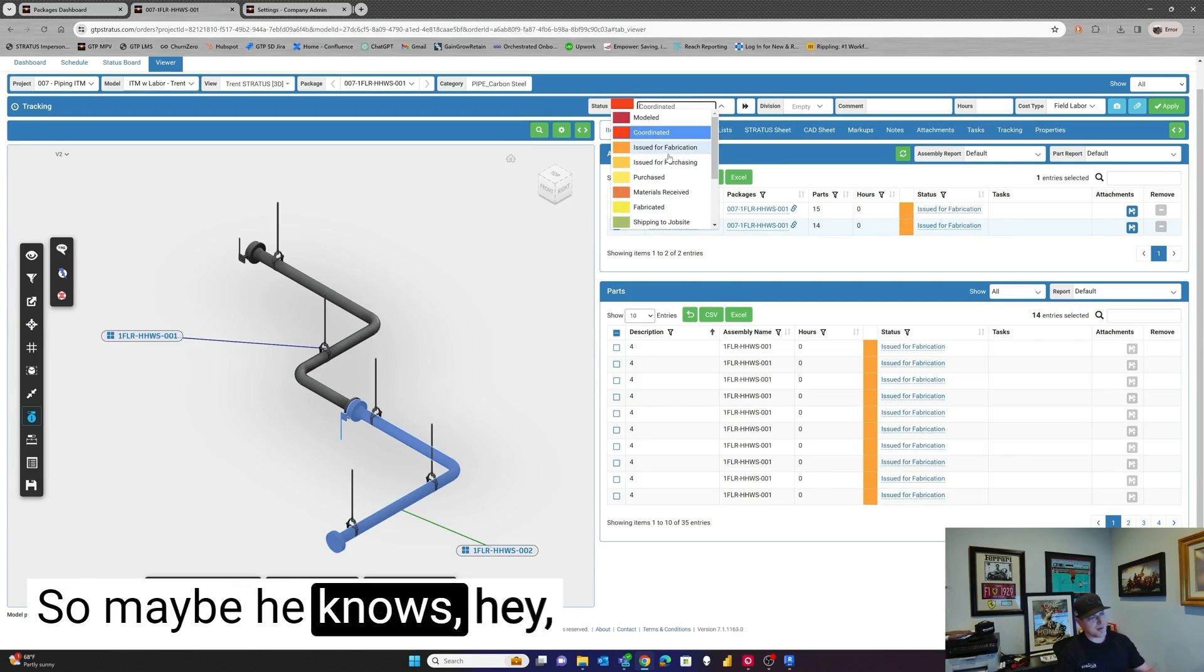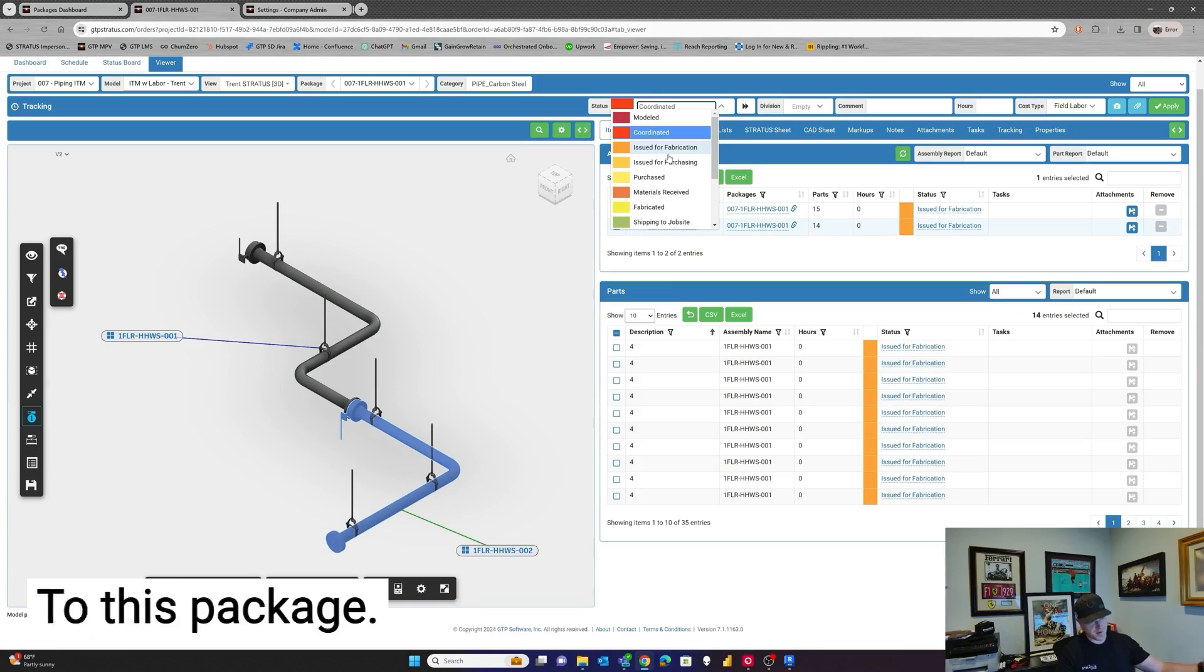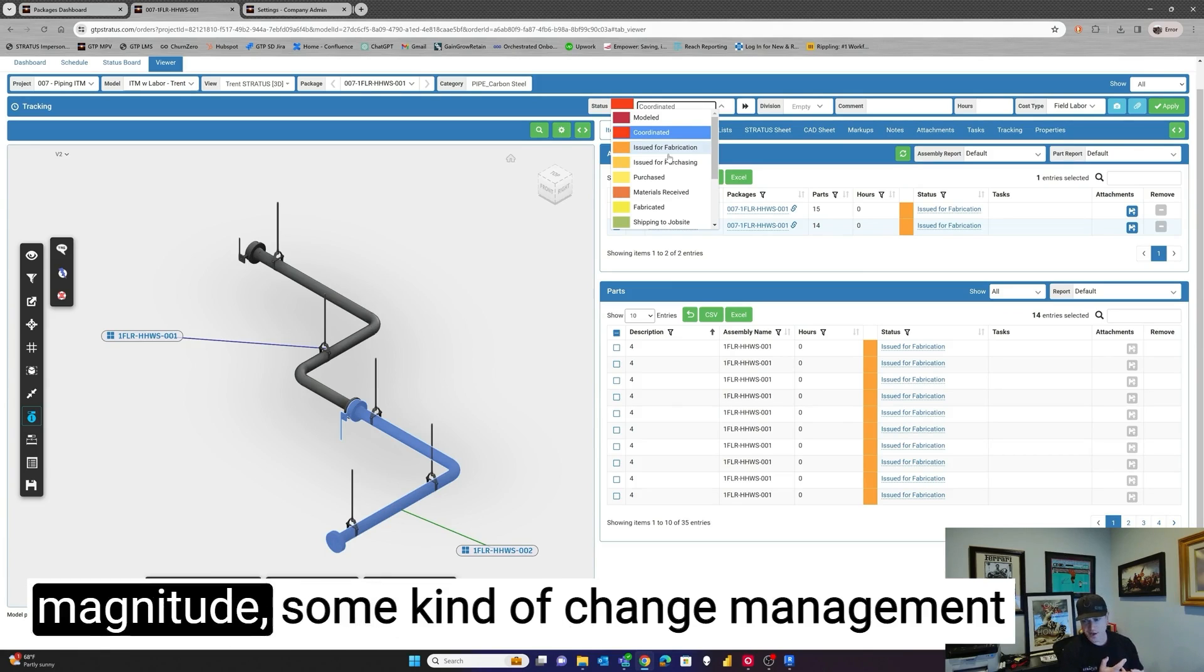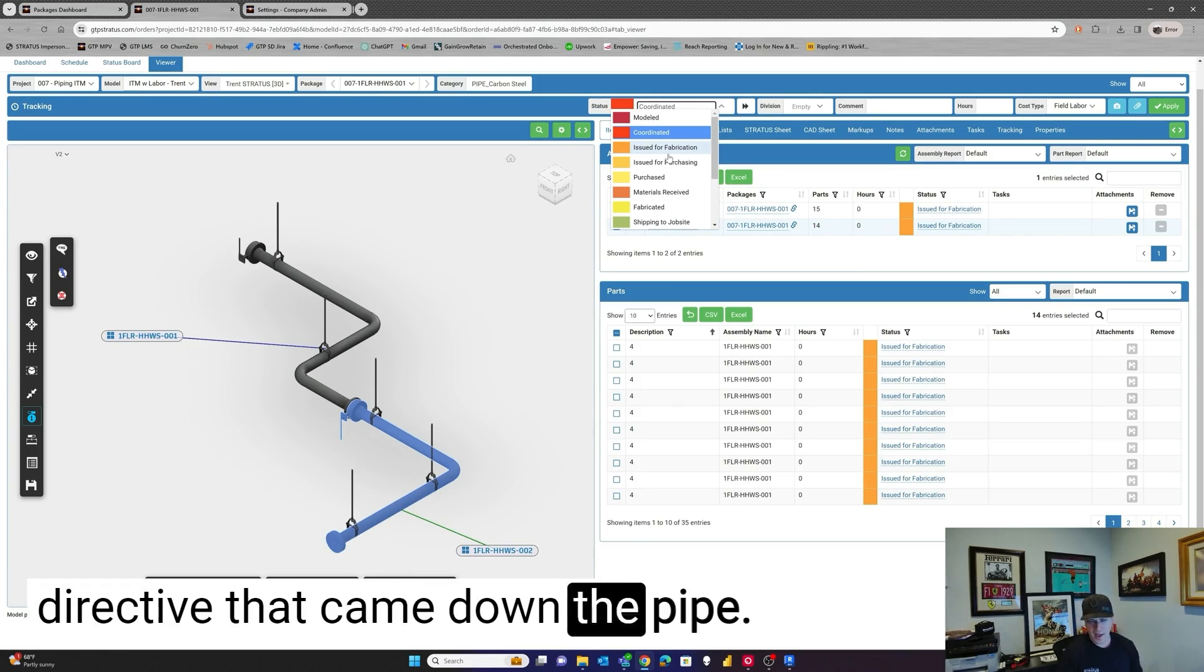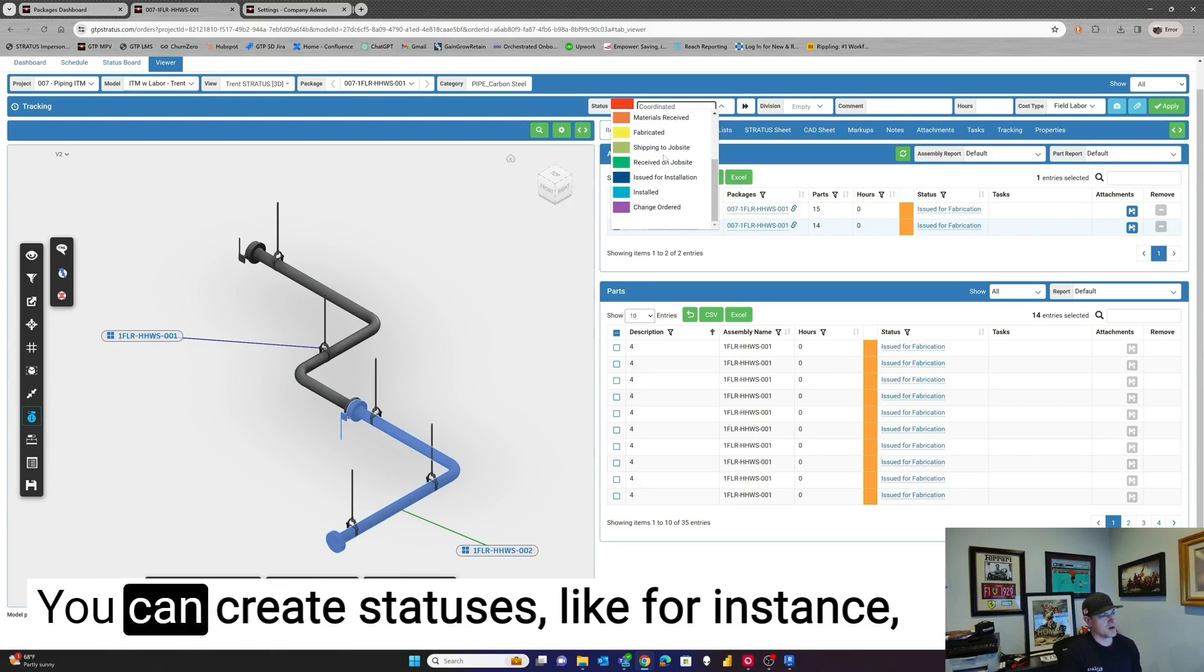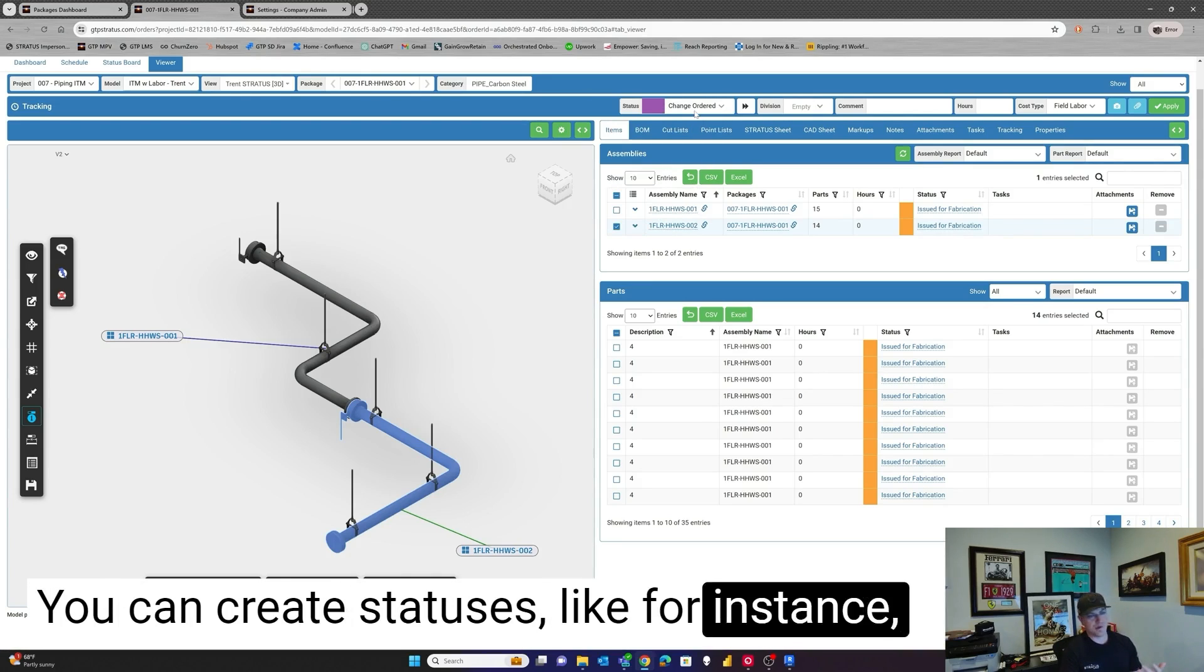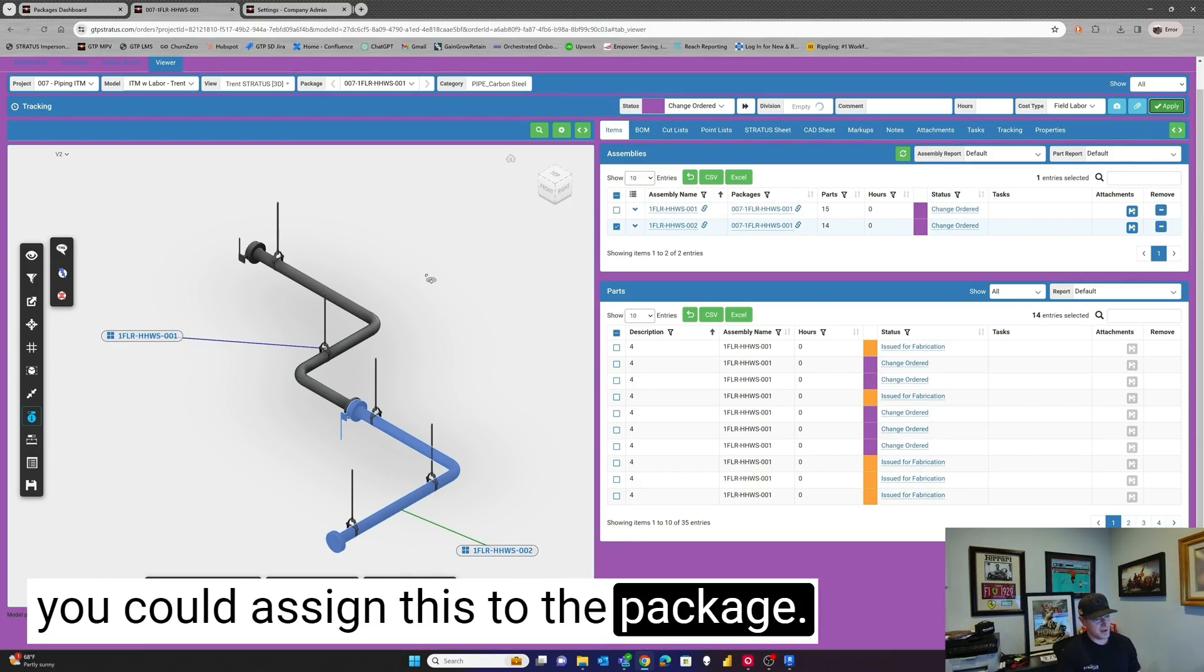So maybe he knows, hey, I've got to make changes to this package. Maybe there's an ASI, rough order of magnitude, some kind of change management directive that came down the pipe. And I've got to make changes to this. You can create statuses like, for instance, one that's called change ordered. And you could assign this to the package.